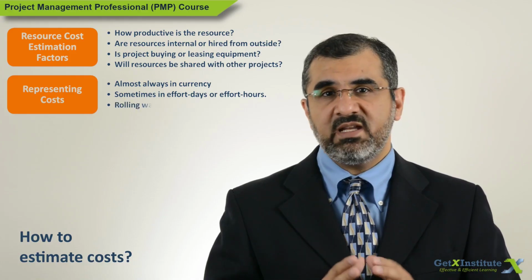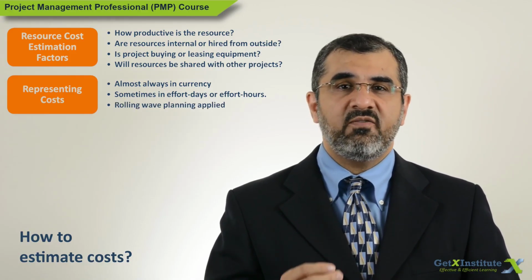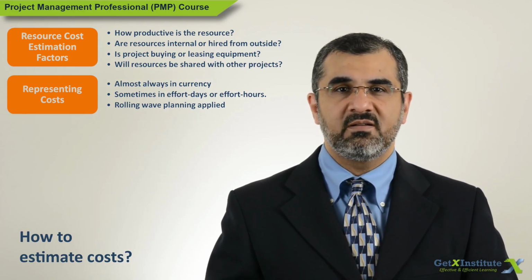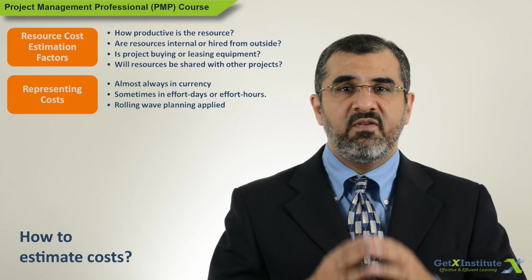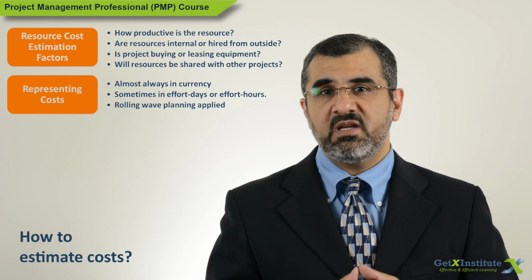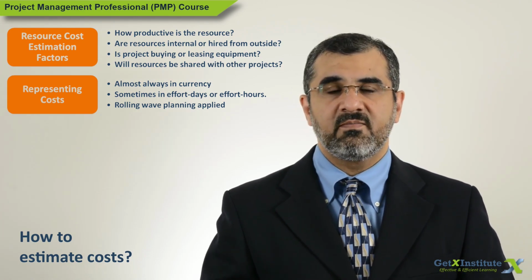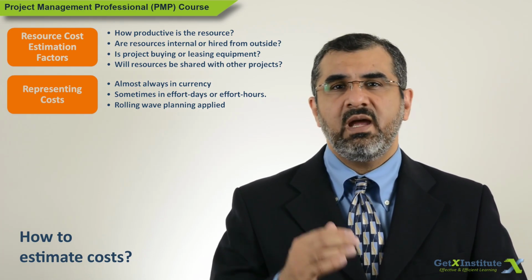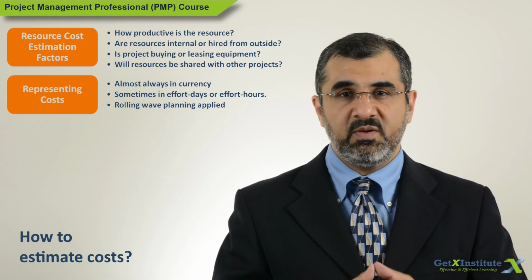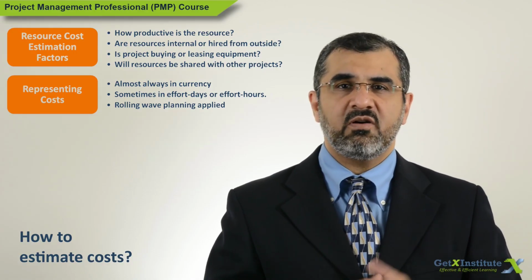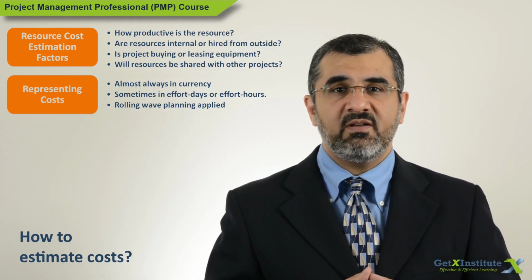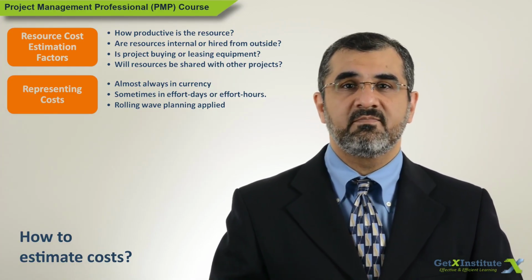The rolling wave planning technique is not just applied for scope and schedule, but can also be applied for cost estimation. Generally, the work done in the later part of the project is at a high level, so the cost estimate will also be at a high level. As the work continues and the project progresses towards completion, more detailed cost estimates will be prepared to have better control over costs. By doing detailed estimation, the confidence level in the estimate also rises.